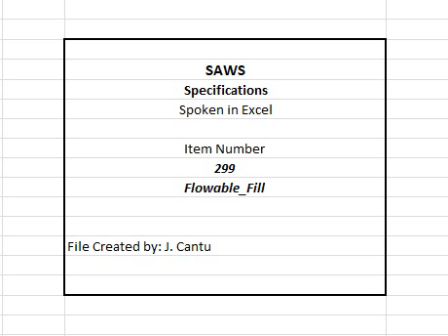full compensation for furnishing, hauling, and placing materials and for equipment, tools, labor, and incidentals and will be paid for at the unit price bid for flowable fill, low strength, flowable fill, high strength, or flowable fill, high strength emergency repair, 4 pipe. Flowable fill shall be paid for at the contract unit price per cubic yard based on the